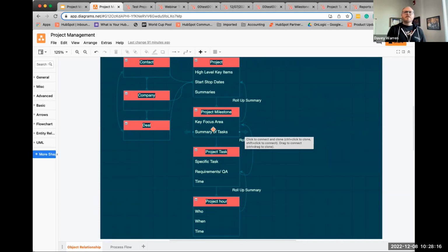So in your estimate, you could start figuring out your margins of completion. For example, we estimate that it's going to take 20 hours a month to do this type of marketing work for a client, and it's a fixed cost. So I don't bill the client anymore, but I want to know my utilization of hours. I can have all my employees mark up the amount of hours they work on it. And I can say I've got 20 hours in here, and I can see whether or not I'm over or under that. If I'm coming underneath it, if I'm doing it in 18 hours, even though I've estimated 20, then I'm making good margin. And maybe you need to adjust for the client down the road or something.